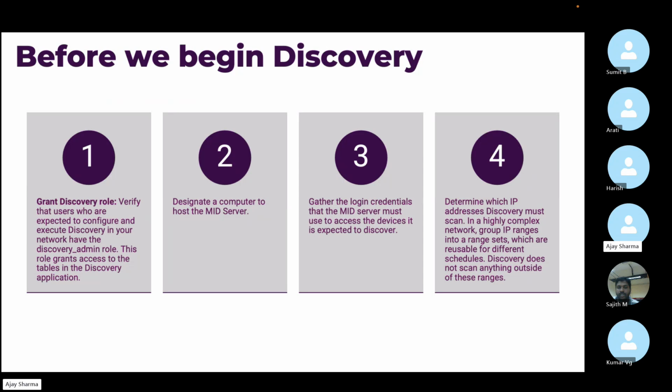Now the second thing is, when your project manager or management introduces you to your customer, this is the customer you have to work with. Once the intro session is done, you try to understand the stakeholders, might be discovery stakeholders and CMDB stakeholders from the customer side, who are going to be involved. So you have to assess the current situation of the customer in the first 2 or 3 workshops. As per the SOW you have the information, but try to ask the customer as well: what types of devices you have, how you are managing your CMDB, and what attributes you are managing in your CMDB.